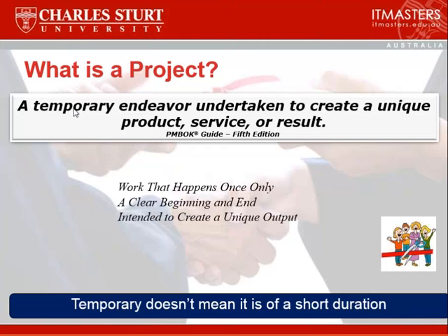Not necessarily the case. There's a satellite heading for Pluto that was launched 9.5 years ago. Could we say the project is complete? Maybe it was complete once the satellite was launched, and we're now in operational mode. But really, at the end of the day, the word temporary does not try to bring it into a short time span. It can be a short time span or it can be a long time span. The important thing is that it is a finite duration. The work happens only once to create a unique product. It has a clear beginning and end, and it's not necessarily a product, it can be a service or result.